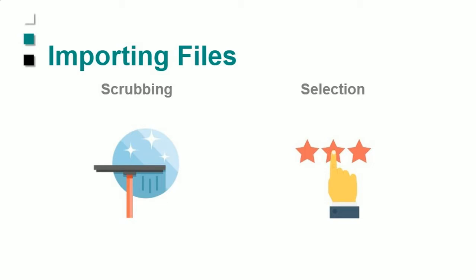And that's really handy because, of course, if you're getting a file from a contractor every week or 2 weeks, you don't want to have to reset all the scrubbing parameters. So she's going to show you that you can save the way you do the scrubbing for a particular contractor. Now, you may have a set standard across your whole organization in which everyone can share. So there's that option too, and she'll touch on that and show that to you.